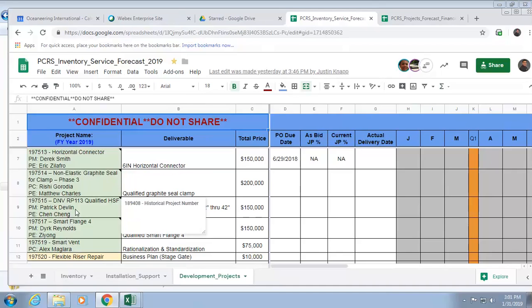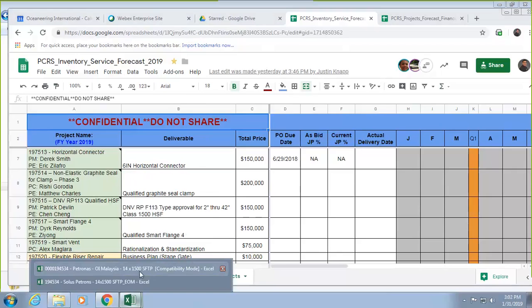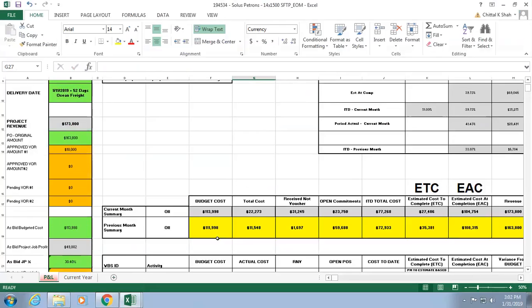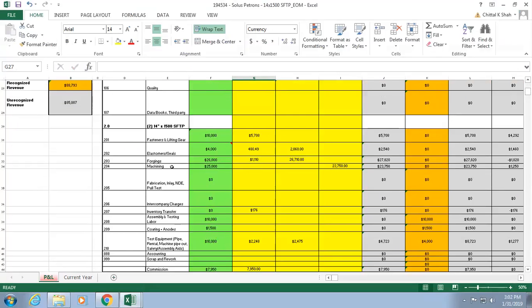Yep. And when Enrique was asking about the WBS numbers, what Chippa showed on the other side is standard for a project. For a development project, we might want to understand the cost going to a certain other bucket as well. Say you have a specific vendor or a specific group that you're trying to see the cost associated with. You can drop a WBS number or task number on it and associate all the costs to it. That way, at the end of the day, you can monitor that cost and understand what it is.